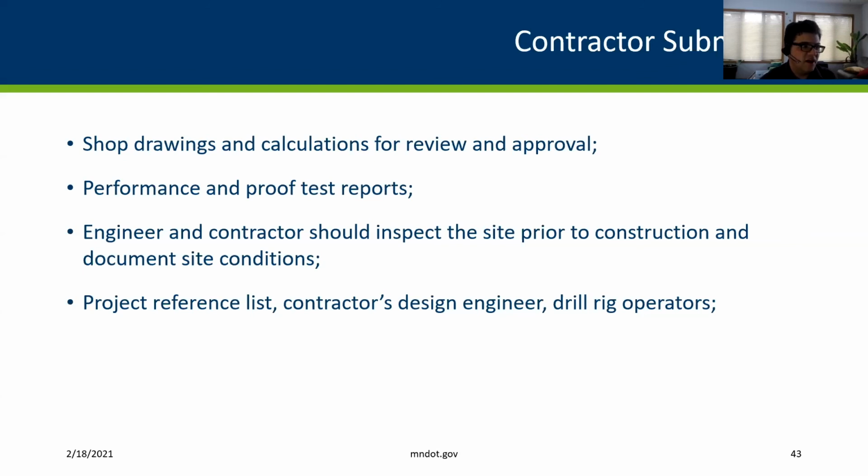The engineer and contractor should inspect the site. So the contractor has the expertise, right? Or has hired someone who has the expertise in placing soil nails. Inspecting the site can avoid any problems, so that as they're excavating, they know what they're going to have to deal with. And if there's any problems with the wall and how it's designed, those can be caught prior to digging a hole in the ground and finding that you can't even build this wall. So it needs to be done prior to construction.